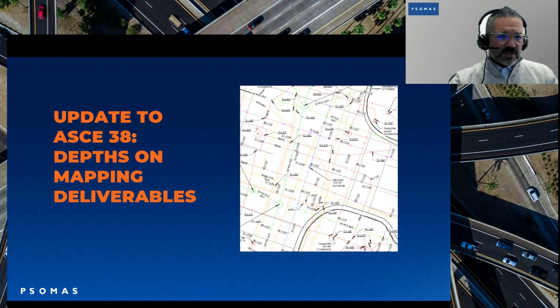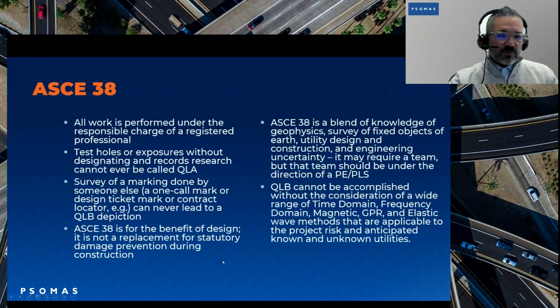So this update also contains all work is performed under the responsible charge of a registered professional. This was an important update to it, making sure that we understand that a registered professional should be overseeing this work. Because you have a lot of these little companies off and going on their own. ASCE wanted to make sure that a design professional is overseeing the work being done and that they're not off on their own doing this work.